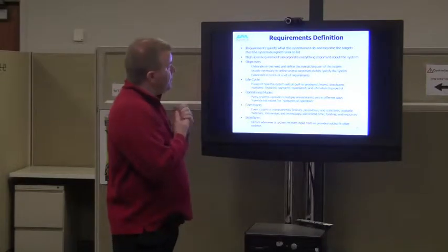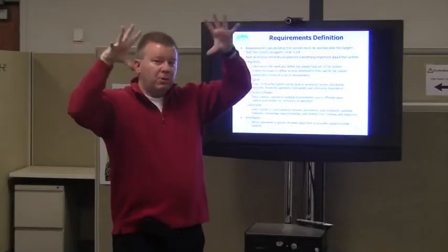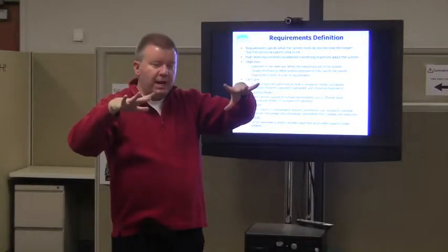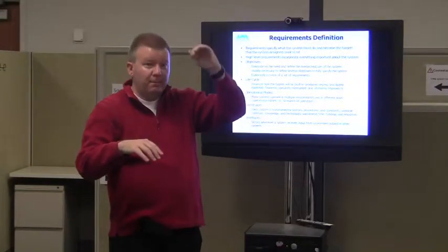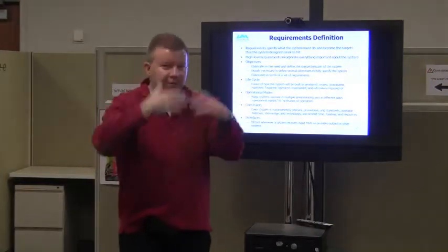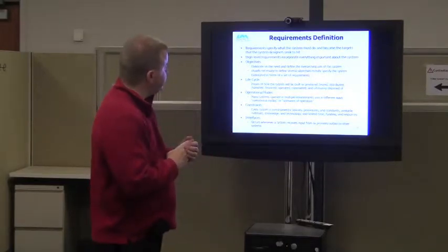The high-level requirements incorporate everything important about the system. So you start with a very high level, start with the need, and then work down, right? Just keep decomposing is what it's called. And you will continue to make more requirements and more requirements and more requirements. We have parents, we have grandparents, we have children, likewise, right? And you can have them all linked together. And so that's what this does.